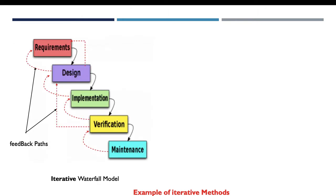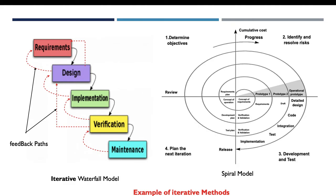As an example of iterative methods, we find the iterative waterfall model. This model is an enhancement of the classic waterfall model — the author added feedback paths (shown as red dotted lines). These feedback paths help the programmer to identify errors and correct them. For example, if we are at the verification phase and identify a design error, we come back to that phase, make the necessary changes, and those changes are then reflected in the implementation phase.